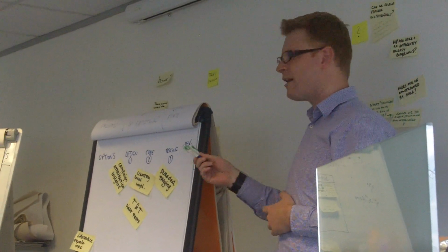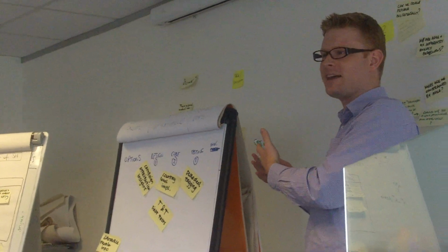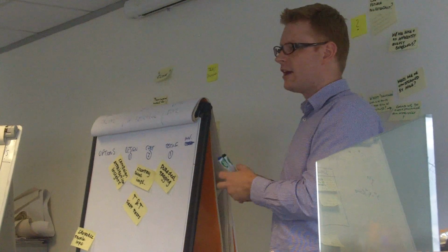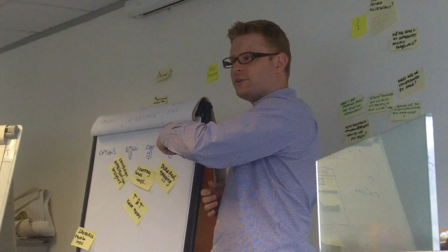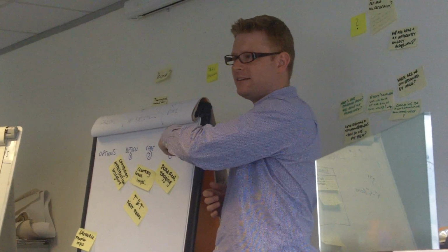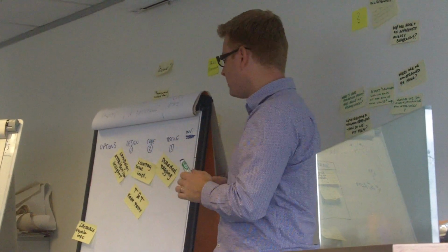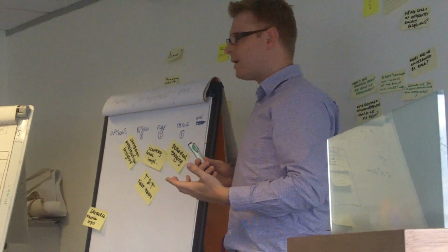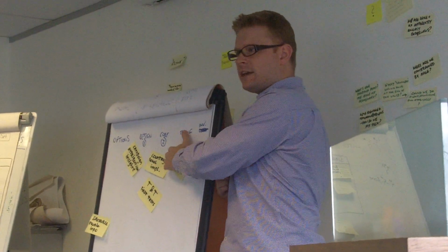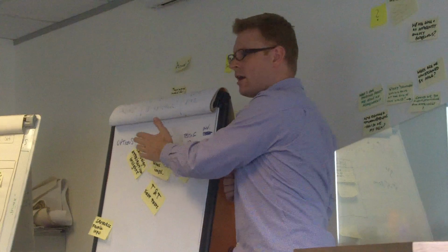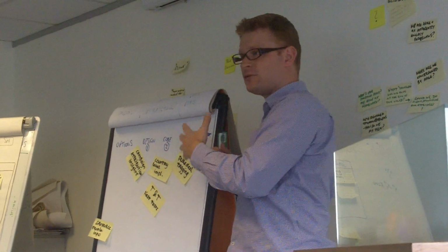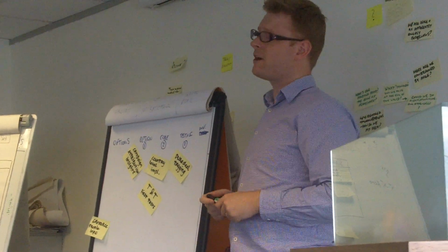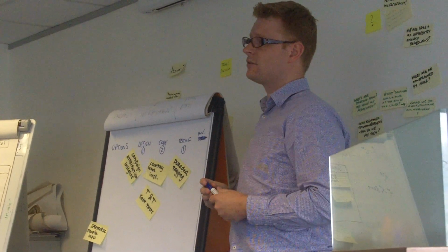That's super simplistic. In that form it won't work because there's a lot more to say about it, and there's some ground rules about how it works. Like you can't just throw things over the wall to a testing team without checking them properly, otherwise that just blocks the whole system up. One of the key things is that anyone in this team can effectively stop the line by saying, this isn't working, there's a blockage here, there's a problem here, we have to sort that out. So any one of these people can do that. It's kind of power to the individual. So that's a very, very brief introduction as to how it works.